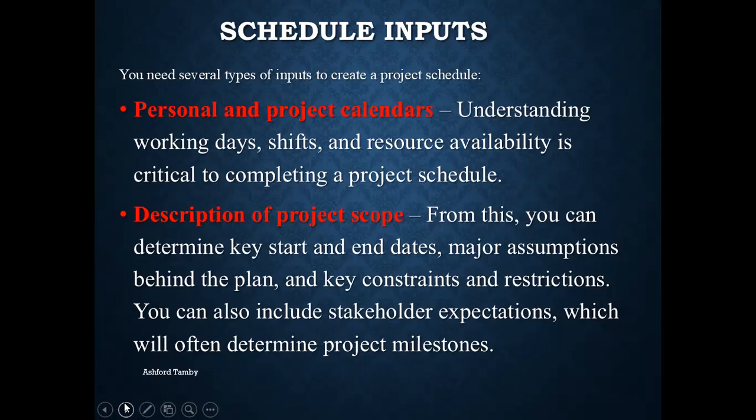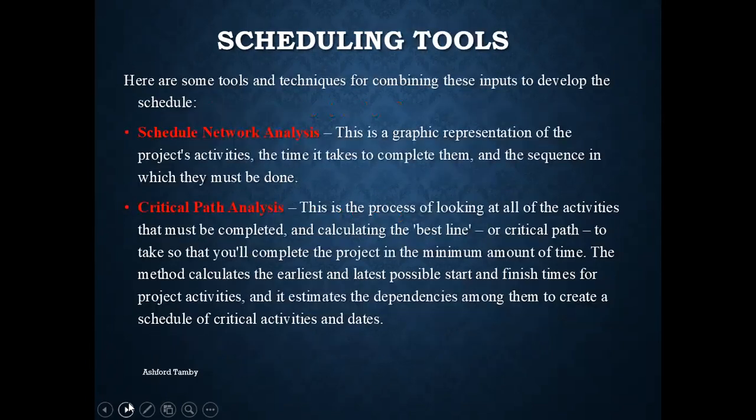And there was this huge backlog of containers and shipments, and also the main port in Florida when you have hurricane season going on and you're waiting for resources to come in, all these things will affect your schedule. So this is why it's important, right, that you understand these things when creating your schedule.